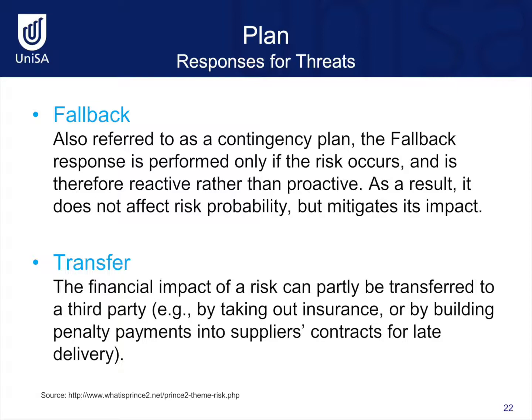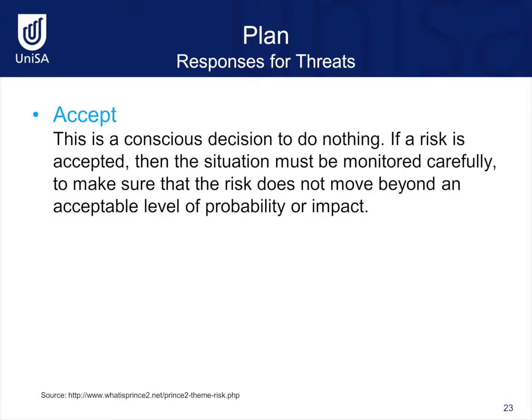With a transfer response, the financial impact of a risk can partly be transferred to a third party. Accepting a risk is a conscious decision to do nothing. If a risk is accepted, then the situation must be monitored carefully to make sure that the risk does not move beyond an acceptable level of probability or impact.